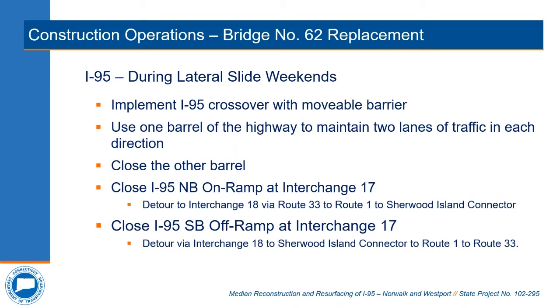As shown in the animation, during the lateral slide periods, one barrel of I-95 will be closed and traffic will be shifted via median crossover to allow for 2 lanes of through traffic in each direction in the barrel which remains open. It is important to note that during these periods, both the I-95 northbound on-ramp and southbound off-ramp at interchange 17 will be closed.